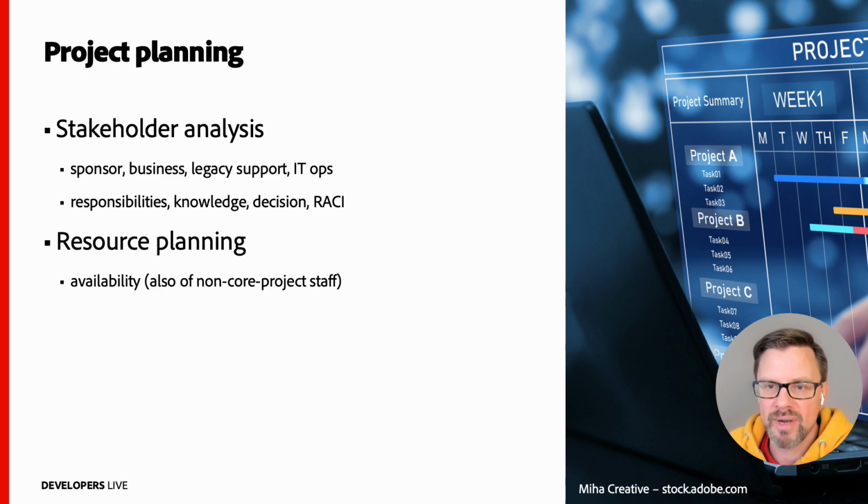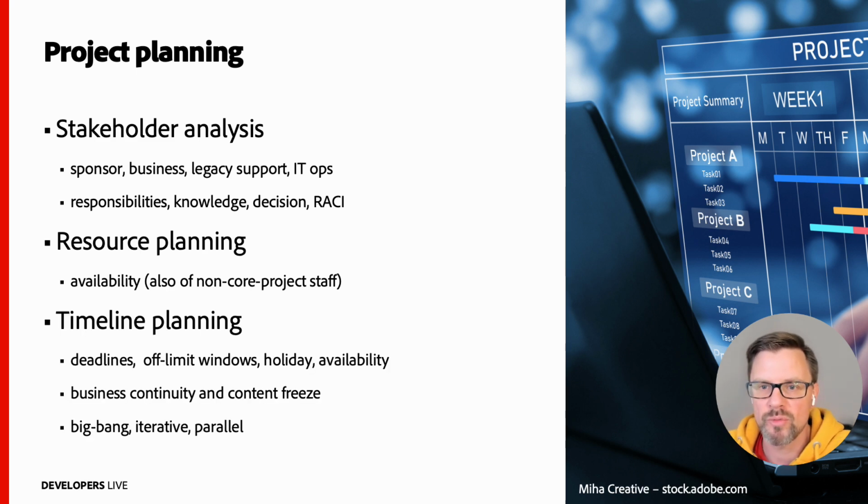Related to the resource planning is the timeline planning. When are which human and technical resources available? Keep in mind that people have holidays every now and then and typically are not available when you need them most. Also, there are times when the day-to-day business is more demanding than at other times, and availability might be smaller. For example, in retail, the Christmas season usually is quite busy and slows down projects.